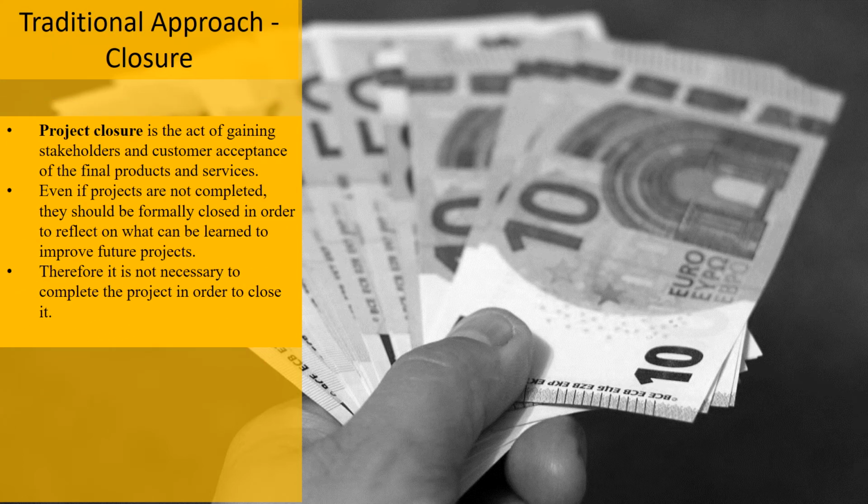Project closure. The closure is the act of gaining stakeholders' and customers' acceptance that they've actually met the objectives and the project is now at an end. Even if the project's not completed, it should be formally closed in order to reflect on what can be learnt to improve future projects. Therefore, it is not necessary to complete the project in order to close it.